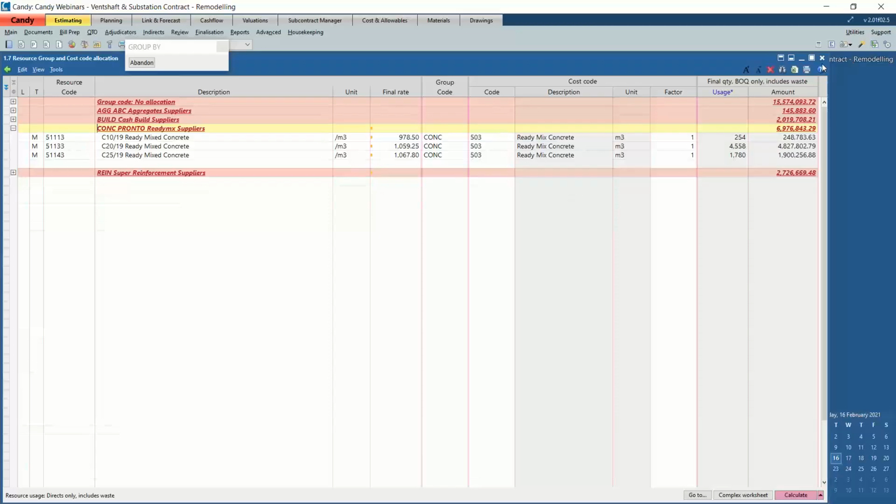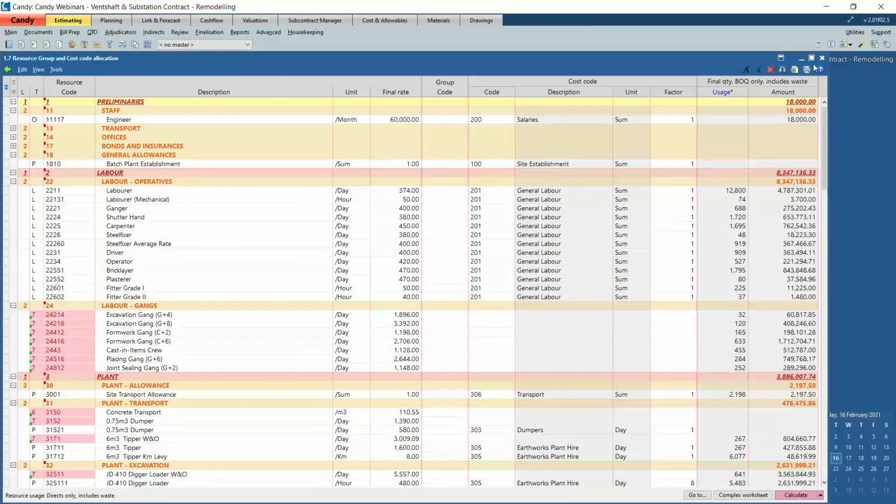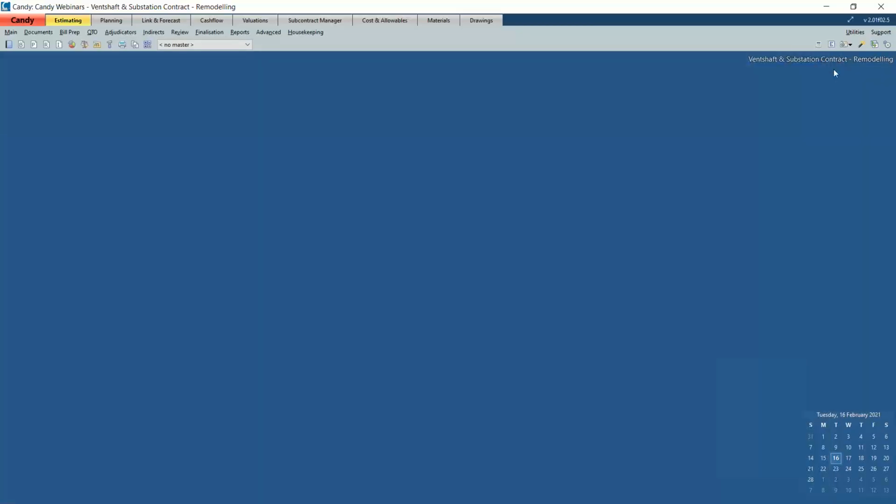Right. And then lastly, the code that I'm going to go through is the task code. So remember, the cost codes are limited to control cost on productive resources, and the cost codes provide a resource-based control for managing fixed resources such as material, but provide a limited control for productive resources such as labor and subcontractors, as well as plant.